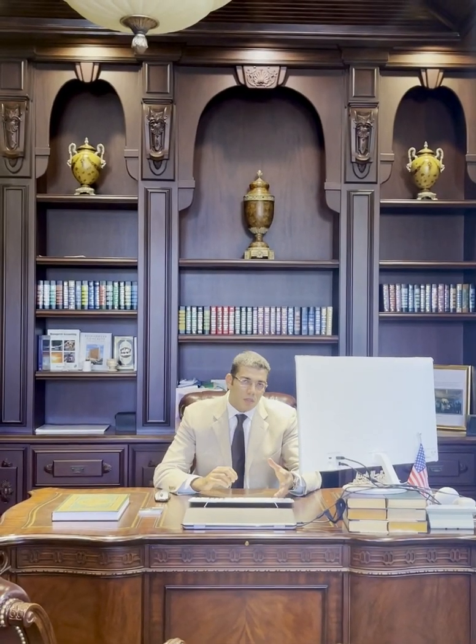Let's say level of development at 300 or 400, doesn't matter. But once every subcontractor creates his own model, the general contractor will create a master model where he combines all of these different models together. Let's say you have models coming from the mechanical contractor, electrical, plumber, and then you have structure and architecture, and you put all this together in one model. And then a good modeler can easily detect any clashes. Once you put the different models together in different colors, you'll be able to see any clashes, and then you can resolve those clashes ahead of construction.